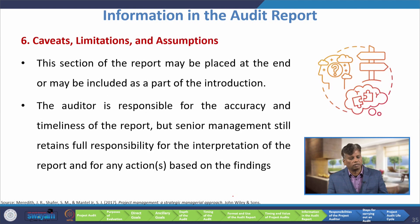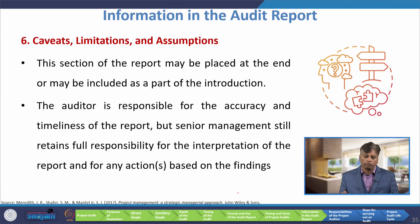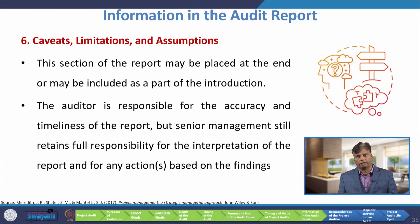The next item expected covers limitations and assumptions. This section of the report may be placed at the end or may be included as part of the introduction. The auditor is responsible for the accuracy and timeliness of the report, but a senior manager still retains full responsibility for the interpretation of the report and for any actions based on it.